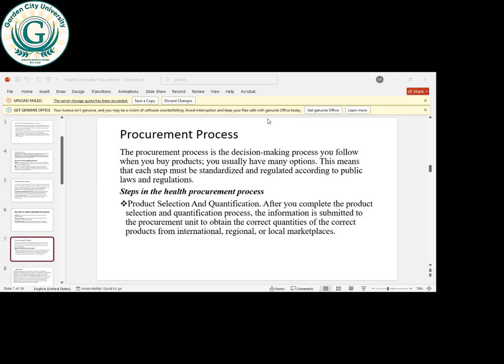We also look at your insurance. Sometimes the insurance should be more than the contract sum. If I'm giving you a $15 million contract and you cannot insure up to that amount, then in case of anything, the insurance company will not pay the money.